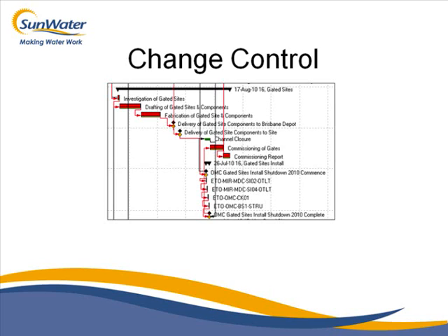We'll pick this. The red path here is your critical path. So all the green ones basically can obviously drift out. If they're not done on that date, it doesn't affect the end date. Obviously, eventually they are going to get to that. You keep pushing them out, and eventually they're going to become red, and it's going to be your critical path.